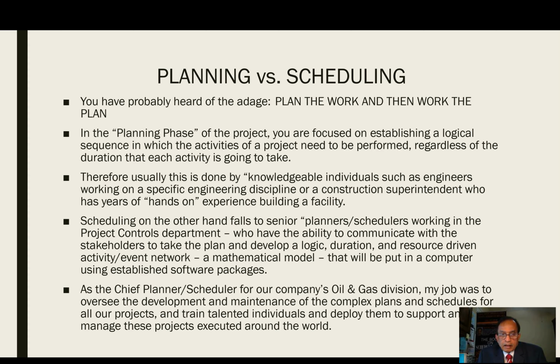Scheduling, on the other hand, falls to senior planners and schedulers working in the project controls department who have the ability to communicate with the stakeholders to take the plan and then develop a logic, duration, and resource-driven activity event network, a mathematical model that will be put in a computer using the established software packages.